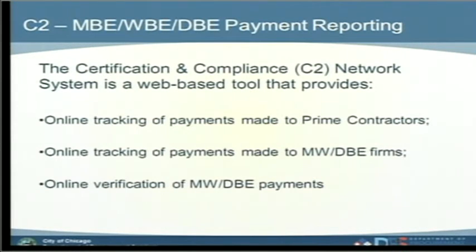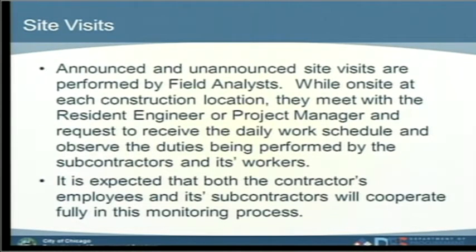Site visits. The site visits will be performed, announced or unannounced, by one of our field analysts. While the field analyst is on site, they will meet with either the resident engineer or the project manager, and they will request to receive the daily work schedule, and they will be observing the duties performed by the subcontractors and their workers.